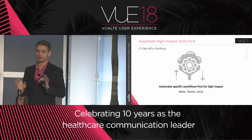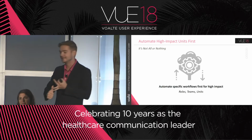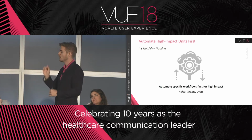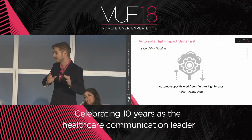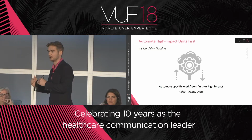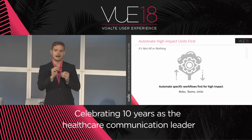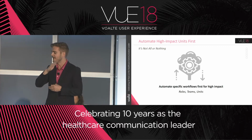But you don't have to do it all at once. It's not an all or nothing situation. We can do specific roles, teams, units, et cetera. If you've got treatment teams for specific use cases that are already accurate, we can automate just that particular portion, let the demographic information flow in for those other units and locations, and then as you start to get those other workflows accurate, we can begin to automate them. So I would recommend focusing on the high impact units first, high impact workflows, teams, locations, get those going, automate there first, and then move from there.